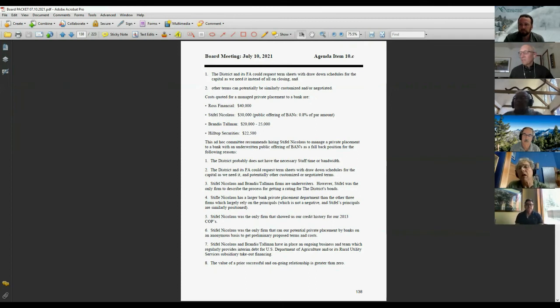And how do you function? It's just not a budget question again. If you have to tear something out that we use and rebuild a new one, how do you technically handle the transition? That tank is mainly used when we have high I&I, so it can be bypassed, quite frankly, in the summer. So that's why we would do that project in the summer. That's one of the reasons. You'd better build things in the summer, especially an outside thing.